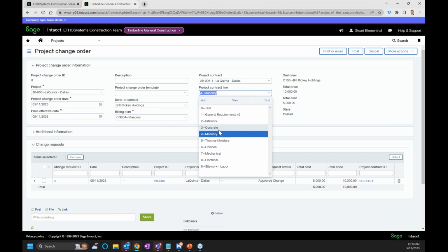You're locked once you do any billing. Let me state that again for the record, because I know I had one client that was, once you make a change, once you do a billing, then it locks it down.